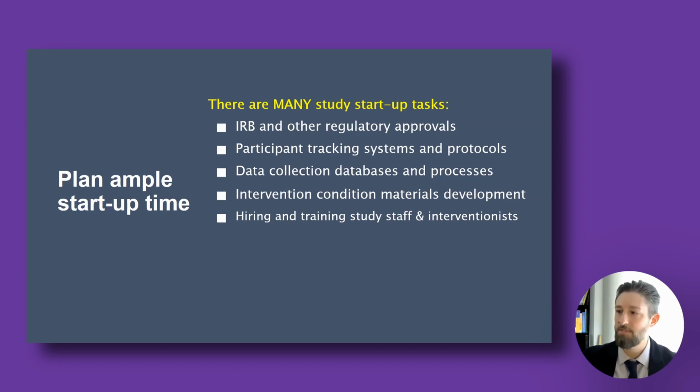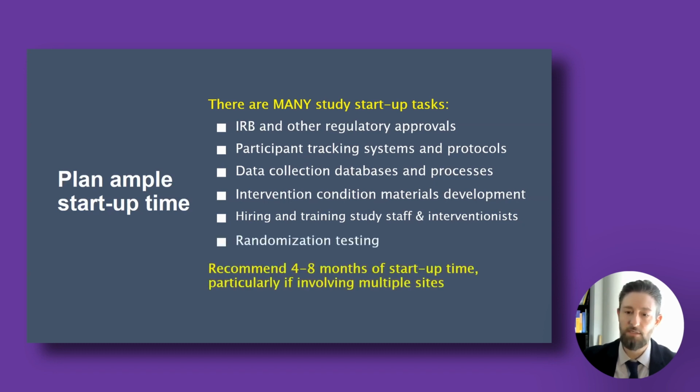And so I would spend some time with that. Randomization testing. So I didn't pull this out of anywhere except my own experience. I would say 4 months. Honestly, I would be sweating bullets if you gave me that time frame to put together a trial. I actually feel more comfortable with a year. 6 months, I mean, I could probably make it happen if I had basically nothing else going on. So anyway, this is to say, if you've never done a clinical trial before, give yourself a year.